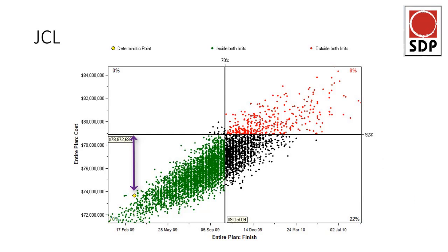Yeah, but you see, in terms of cost, if you look at the singular probability or the confidence level for cost, that's actually sitting at a 92%. Now, you can see that the 92 for cost and the 70 for duration is going a little bit out of whack. That means that this project is probably a bit schedule constrained. In other words, it's schedule driven. That's why if you want to go quicker, we're going to have to add more cost, and that's why your cost number now starts kicking up, because risk events or systemic uncertainty or project specific risk was driving your cost estimate to hit a specific schedule constraint date. That's why you're seeing the two going out of whack.